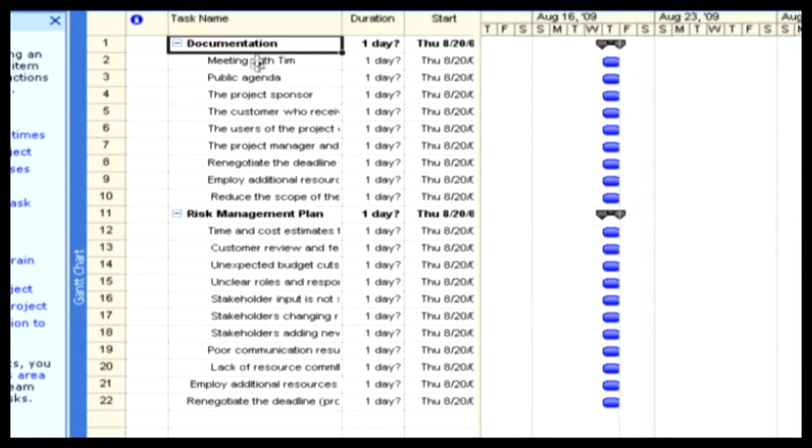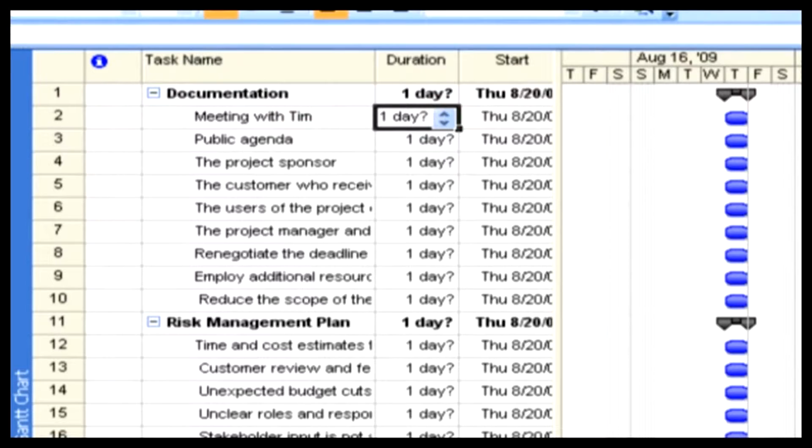So we have our project page open. We have some sample tasks here. We'll look at some examples of durations. Consider that our task duration is just 6 minutes. Then just write, I'm erasing this one, then write 6M, then press the Enter key. See, now the 6M has been changed to 6 minutes. And see the changes in the Gantt chart also. The bar is very small.